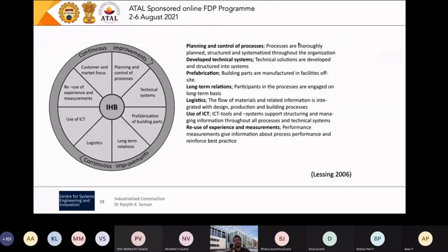All those things. Important part, every time we are doing each of these steps, we need to measure and try to understand where the bottleneck is, and improve it. So that comes from lean construction: identifying the waste, categorizing everything into value adding, non-value adding but necessary, and non-value adding tasks, and removing the non-value adding ones to make things better.